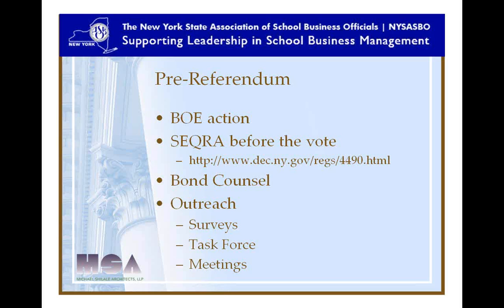The pre-referendum work is usually only a small part of the design and documentation phase. It's enough to get you some preliminary budgets where you know what's happening, but there always are issues that come up, whether it's identification of hazardous materials, or as the design progresses, some code issues or the EEB issues that may cause your scope to change a bit, or community issues at times.